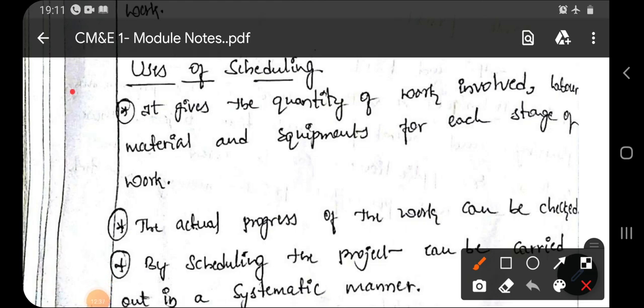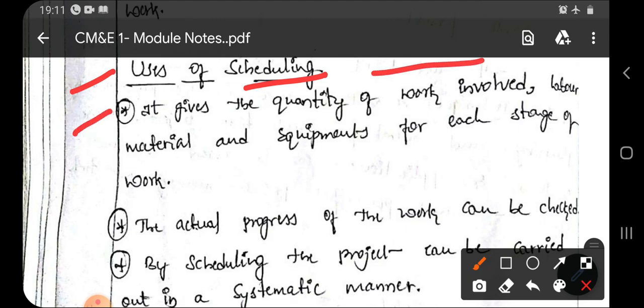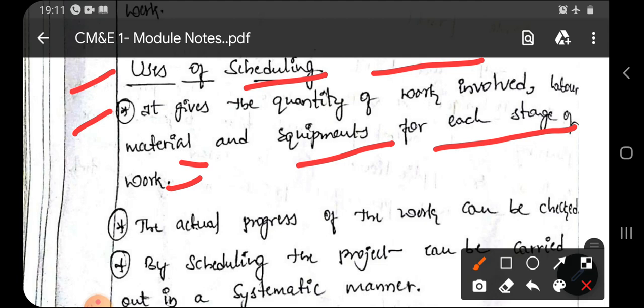Next comes the uses of scheduling — the advantages you can get if you schedule your project. The first advantage is that it gives the quantity of work involved — labor, material, and equipment — for each stage of work. Proper scheduling gives the quantity of work involved, and based on that quantity, you can calculate the time required for completion of each activity, which leads to computation of the entire project duration.